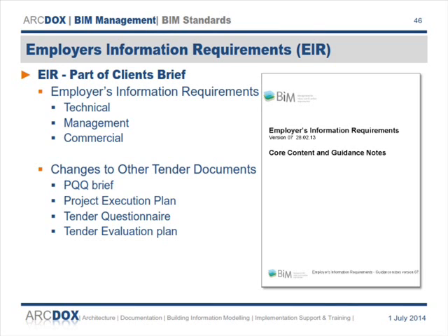Okay, and we're using this now in creating employers' information requirements for projects that we're involved with where there isn't one. What we would normally do on a project that comes to us where there isn't an EIR is we would backtrack and try to define out of the brief what the employer's information requirements are and try to get those agreed as a sort of starting point for the project.